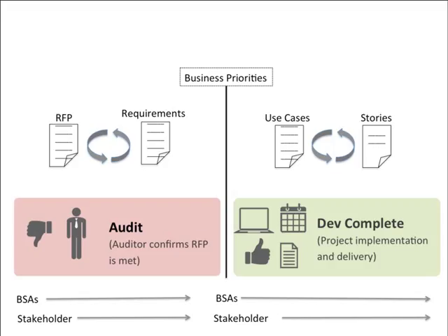And worse is that if we really went back and looked at the RFP, which they do an audit at the end of the day of the RFP and the end deliverable to understand whether or not we delivered what we said. And so the problem is that because the RFP is so far disconnected from the development that took place, it became out of date. It wasn't being updated as changes occurred.